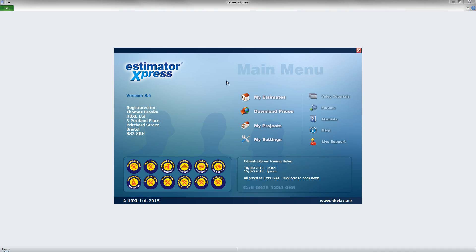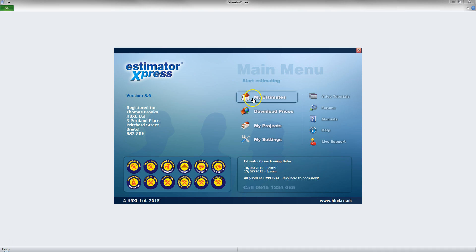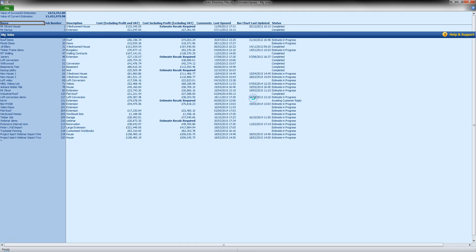Before starting your estimate, it is generally good practice to click on the download prices button to bring down the latest market averages or prices from your preferred supplier. Once done, return to the main menu and click on My Estimates.